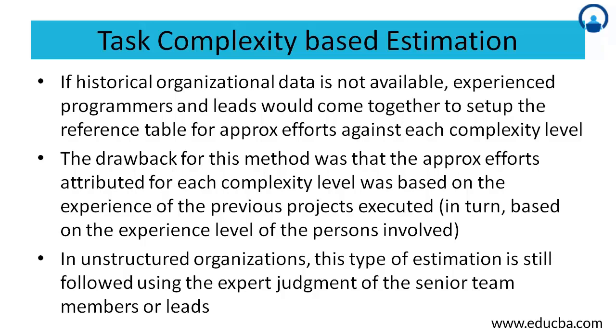Let's say a small startup, or one that is not very process oriented, they would come together and instead of doing a completely ad hoc estimation, they would break down into small, medium, average, complex, or very complex effort structure, and then decide collectively what kind of effort needs to be attributed and then add it up.